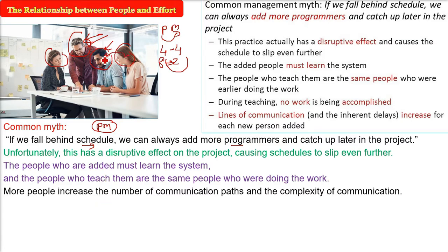And more people means more communication. The number of paths will increase. The complexity of communication will increase. And that will slip your schedules even more. So these are some inherent factors which are to be considered.